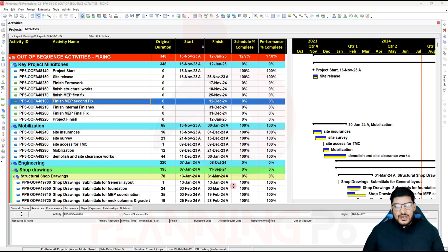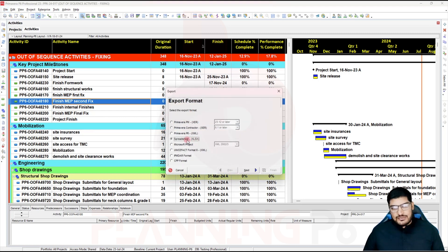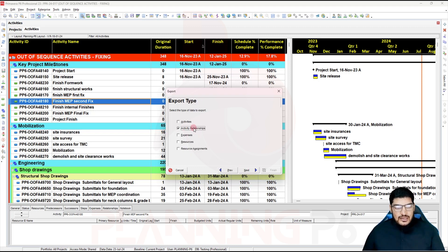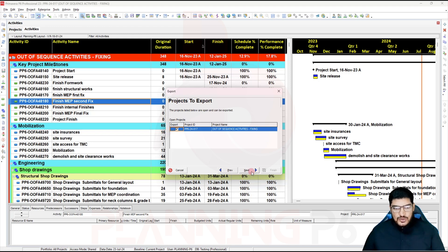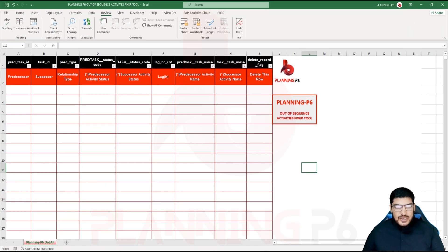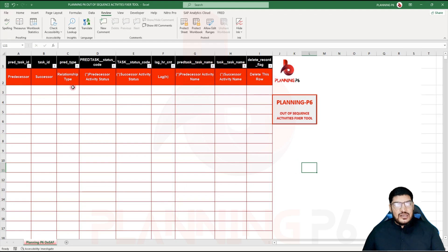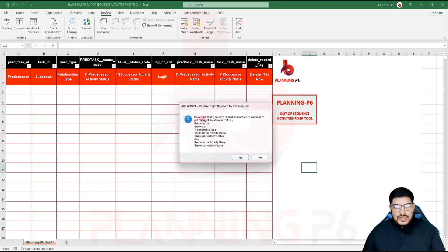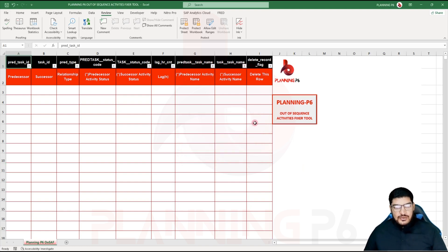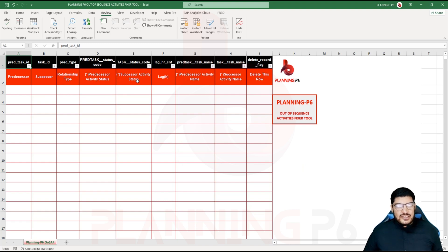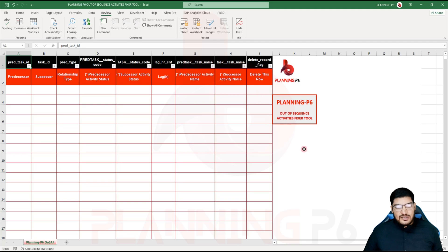To export, go to File > Export, then select Spreadsheet XLS. Click Next. I will export the activity relationships — check 'Activity Relationship' and click Export. For the columns we need: Predecessor, Successor, Relationship Type, Predecessor Activity Status, Successor Activity Status, Lag in Hours, Predecessor Activity Name, and Successor Activity Name. Delete any extra rows — it will work automatically.